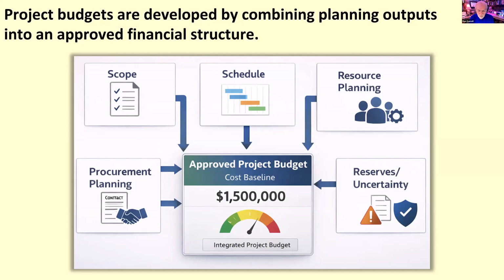And so budgeting also includes contingency thinking, rather than assuming that everything will occur exactly as planned. What this means is that we'll have management and contingency reserves to worry about. Contingency reserves come out of the risk management process, and we'll talk about that, I think, in a week or two. From the risk management process we identify risk responses, which become our contingency. And there's a cost to those responses, so we have to allocate that into the budget.